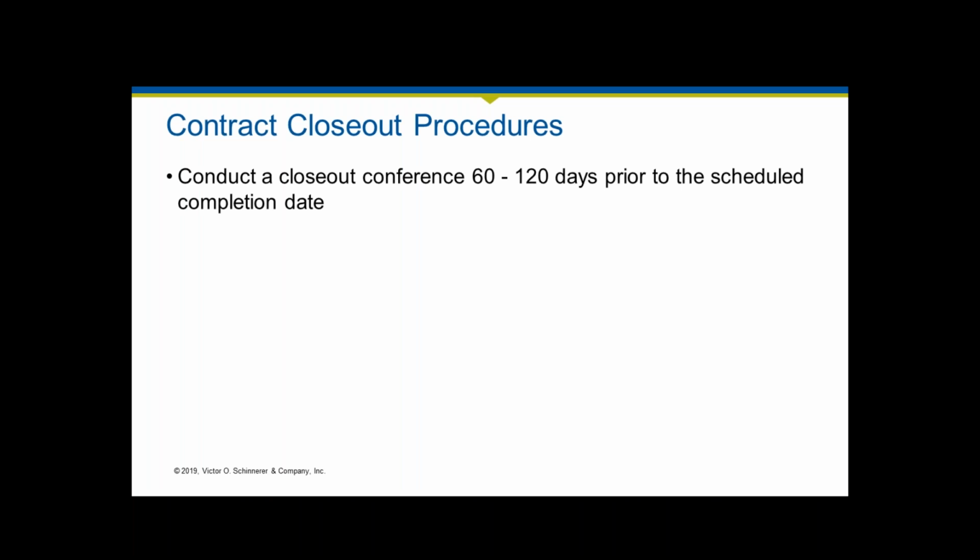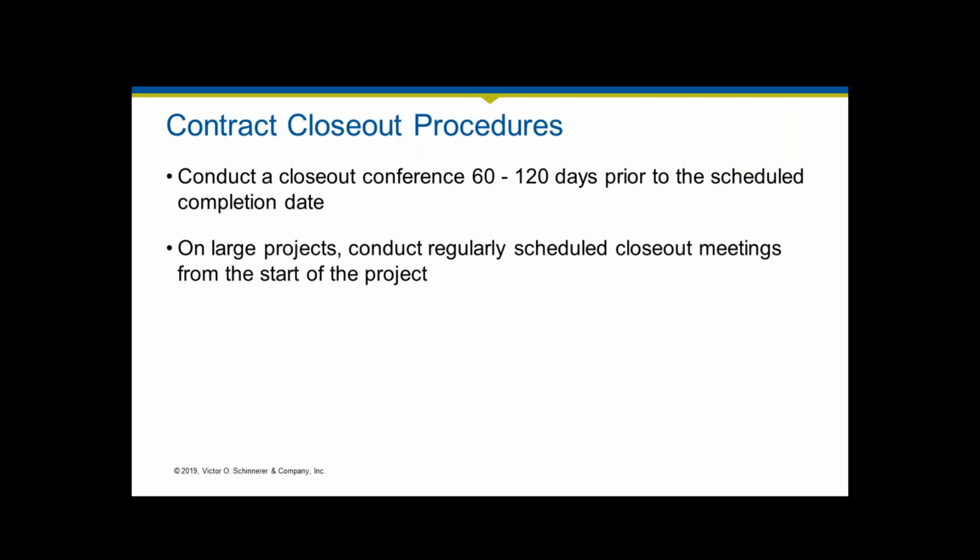So, we have some general guidance, but a closeout conference to get everybody on the same page as to how the handover of this construction site is going to be done is essential. For larger projects, this could actually start soon after the start of the project, so that you have regularly scheduled procedures and undertakings about how this is going to look.